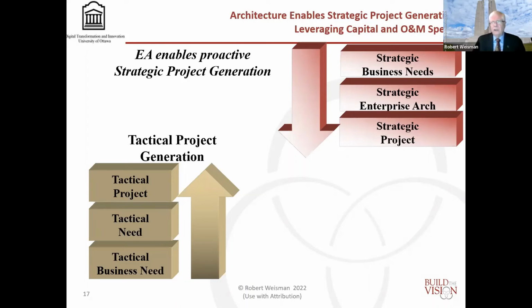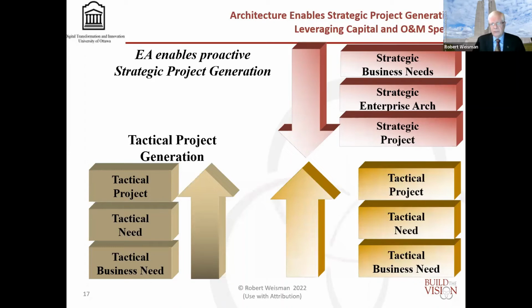However, it still has to enable the bottom up stuff. Okay, when you do gap analysis, sometimes some of the work that has to be done to change from baseline to target is going to be enhancements, which is operations and maintenance funding rather than capital funding for new capabilities. What you really have to do is put integrated governance in, and that's where the management consultants have to be really tight. I've seen organizations where 95% of the maintenance spend is not coordinated with the capital spend.